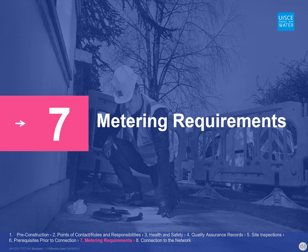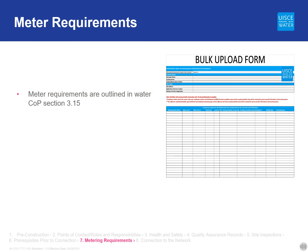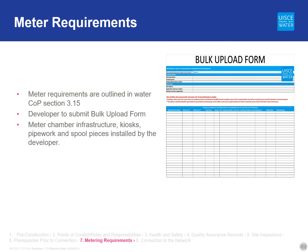Boundary boxes and bulk meter chambers are provided and installed by the developer. Irish Water's delivery partner will supply and fit all water meters required for developments. The requirements for installation of water meters and associated chambers are outlined in section 3.15 of the Water Codes of Practice. Before a connection is made to the network, the developer must submit a bulk upload form to Irish Water. This enables Irish Water to create water point reference numbers, also known as WPRNs, for all units paid in the connection agreement. The coordinates must be to Irish National Grid and the addresses provided must be the same as agreed with the planning authority. A bulk upload form is available in the appendices of the self-lay agreement or can be requested from Irish Water. All meter chamber infrastructure, kiosks, pipework, and spool pieces shall be installed by the developer.